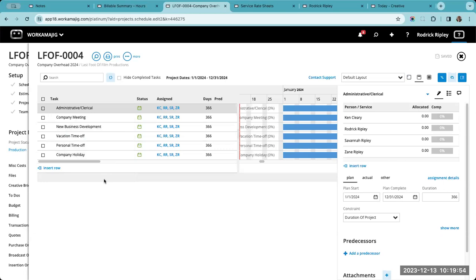The problem with creating a project like that, however, is you start opening up a repository for your users to just dump time to. And that can lead to long-term issues of people's chargeability, billability. Okay, now we're not billing for all the time that people are entering. So it can be a challenge, but yeah, I have seen it where you create a non-billable project per client for those types of situations.